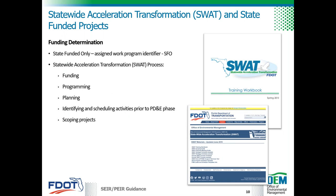If it's determined that the project will be state funded only, it's assigned a work program identifier of State Funds Only or SFO. Once determined to be an SFO project, it's not easy to change to a federal project. The funding determinations and programming decisions are made early through the Statewide Acceleration Transformation process or SWAP process, which is a project management approach that streamlines FDOT's project delivery through early coordination among the different functional offices within the district.